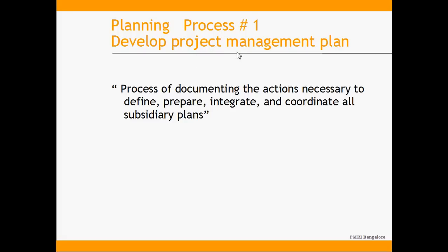Develop Project Management Plan is the process of documenting the actions necessary to define, prepare, integrate, and coordinate all subsidiary plans. In a large project, there can be an engineering plan, QA plan, human resource plan, quality plan, test plan, and configuration management plan — all owned by different entities. As a project manager, one must produce an integrated project plan by pulling together these independent plans, using their major start and end dates.